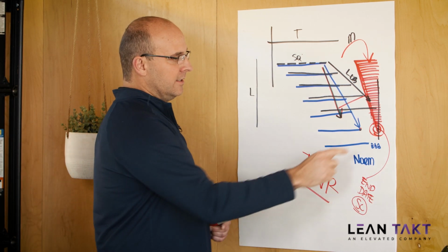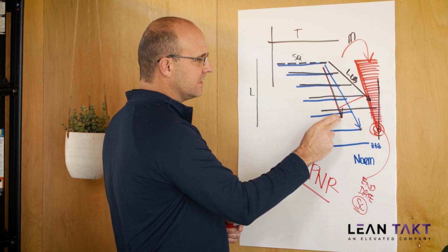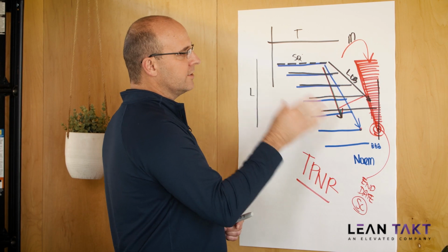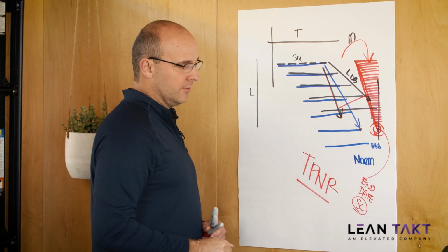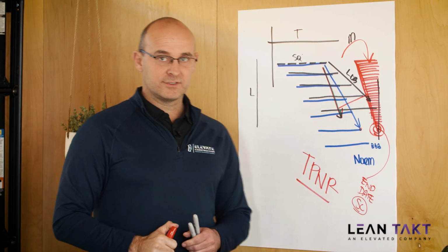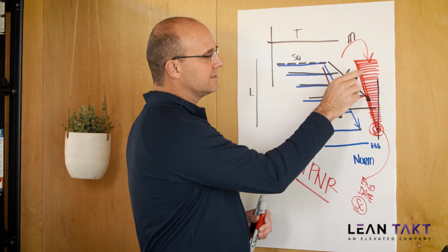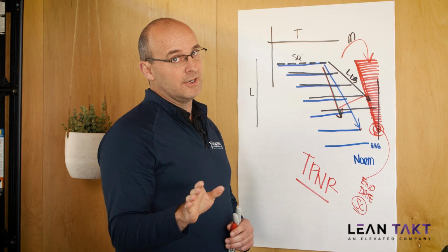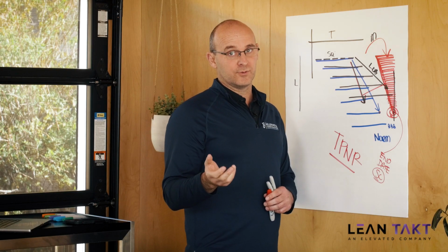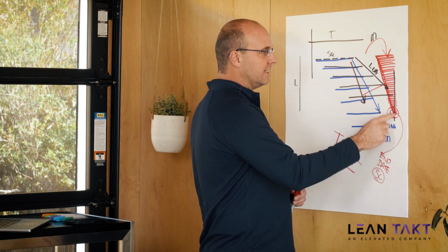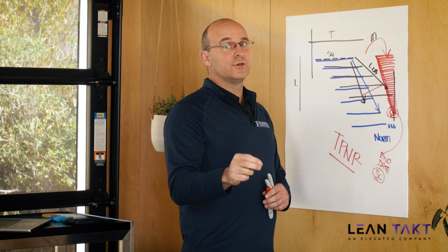So one more time, the end date, it starts here at your last activity, and the incline matches your fastest backup speed according to the realized flow potential video, which I'll link you to in the description below. So here's why I like to have this on our takt plans. A lot of times people will say, hey, even if I eat into this, I'll just trade stack. It ain't gonna happen. Your trades can't be in too many locations and just magically produce work. There is a rhythm, and this line identifies the absolute fastest rhythm at which you can complete your work on the project site.